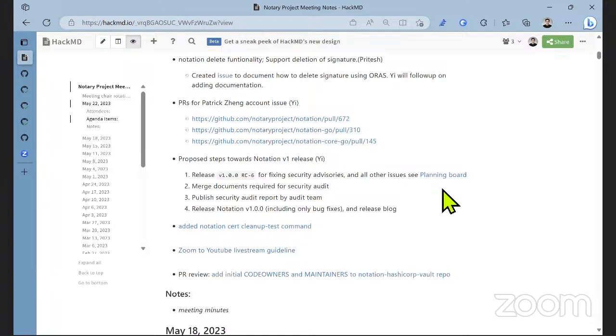So if we work with Adam to get a good schedule, we can target to publish, and we don't need to wait for the report to be published before we publish. I mean, we can simultaneously release 1.0 and the report. That's my point. So let's figure out the dates and put some target dates, and we can work towards them. Otherwise, if we don't have target dates, it will keep moving from day to day. So that's my ask.